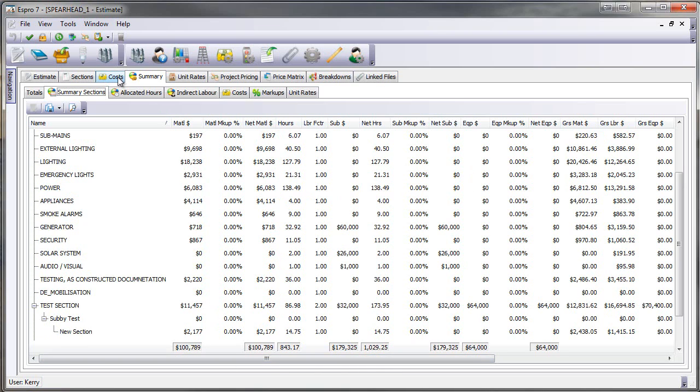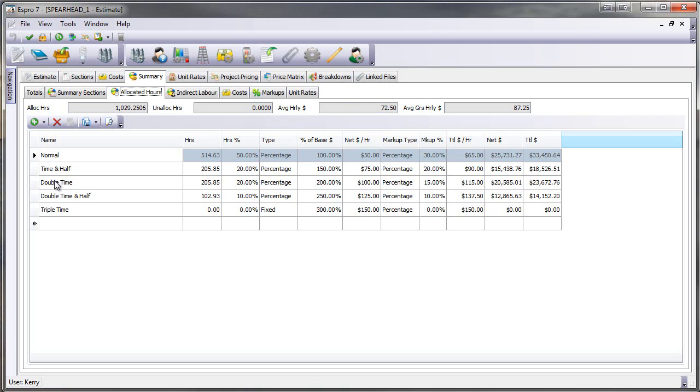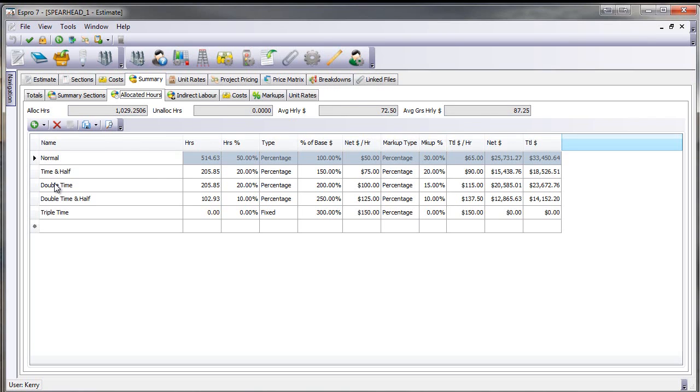And down the bottom, I can see those. I can go to my allocated hours, where I can actually allocate all of the hours I've got. I can actually nominate the hours or I can allocate them by a percentage. I can do it by time and a half, double time, or I can do it by employee. I could put tradesman, apprentice, TA, supervisor, etc.